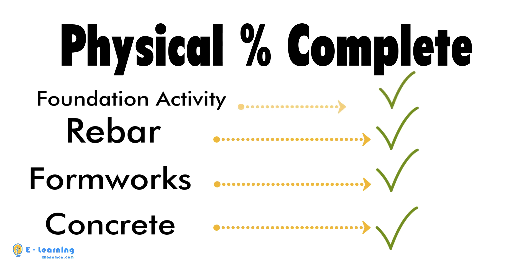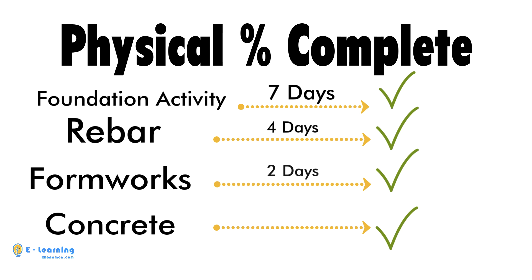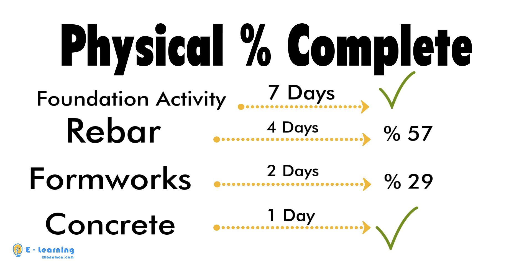The duration type of foundation activity is 7 days. I will divide the 7 days among its activity steps: 4 days for rebar, 2 days for formwork, and 1 day for concrete. So, 57% is rebar, 29% is formwork, and 14% is concrete.